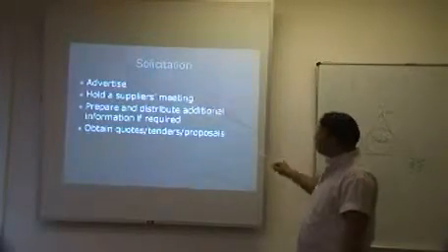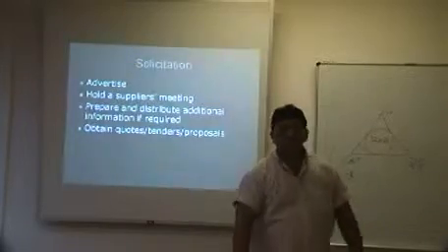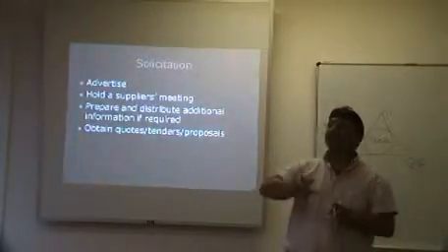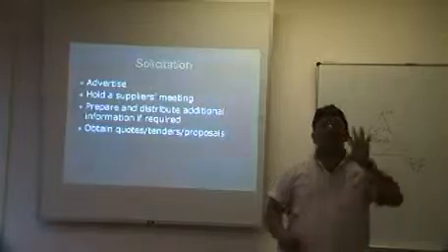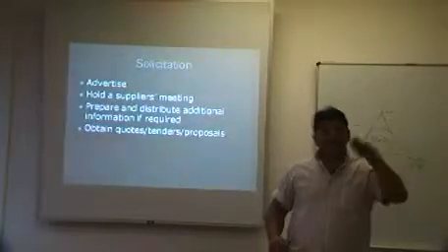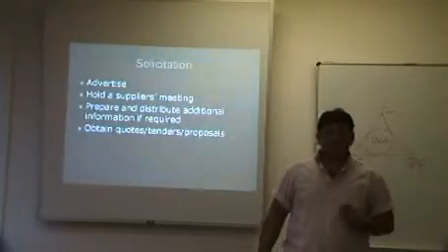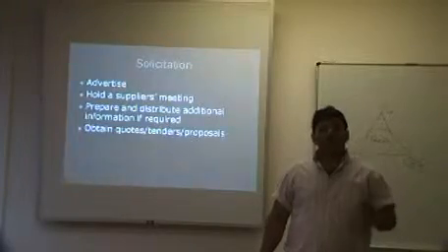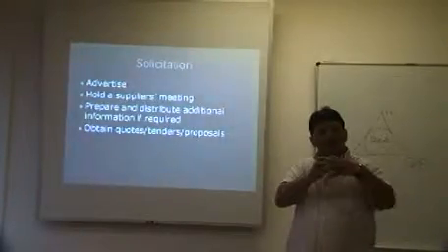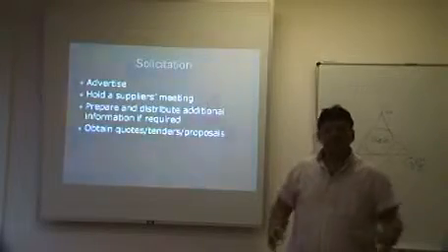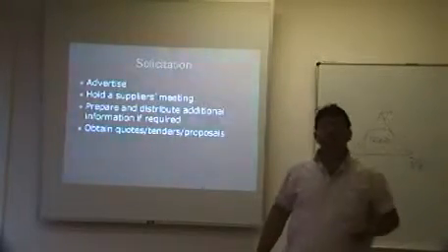This is what happens after the suppliers meeting. After the supplier meeting, the suppliers go away. They will go and prepare their tender for this particular solution or product. And during that process of 2 weeks max, people will ask for more information.